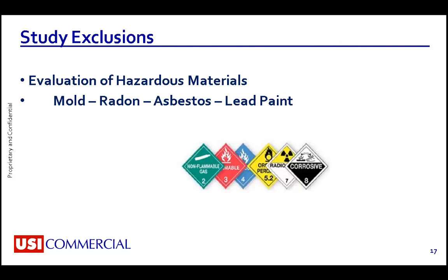Evaluation of hazardous material in the buildings or on the grounds of a property would not necessarily be included in a reserve study. These would be items that would not be considered reserve line items. They should not be funded in a reserve study, and you can have these evaluated by the appropriate professional.